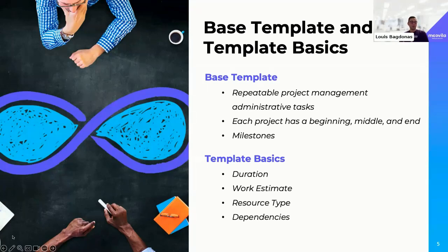I asked a little bit then, well, what about those custom projects you've never done before? It's a new application deployment that you're doing for a customer that's maybe getting into a new industry. How do you start that project from a template? And Rob's answer was exactly what we've been seeing and talking about: you should still have your base repeatable administrative tasks in a template that you use on all your projects.